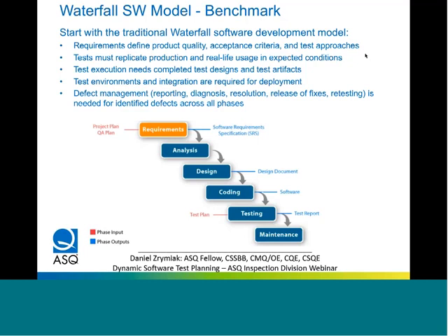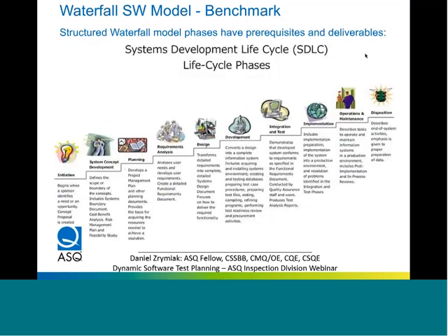Because of that, the timing and duration get pushed out, and especially if there are delays in the early phases like requirements and design, that slippage will propagate through to the end of the project. If you have infinite release time, that is not a problem, but if you have a fixed release date and you have slippage in those early phases, then that's where it becomes necessary to have a more creative approach for testing. And this is just a more elaborate example of that.